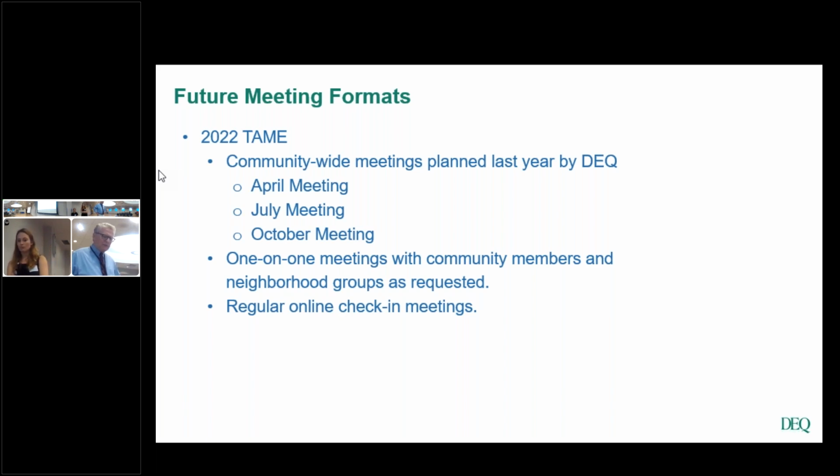Yeah, and just as a side note, I don't know how much you heard about these issues with supply chain. Well, they're real, and some of the hardware that we've been purchasing for this project has taken far longer than expected, at least based on historical averages. So that's another difficulty here. We just don't know what kind of impact that will have on anything we put into the procurement process. So we're a little bit hesitant to nail down a specific date. I will say this, as soon as we can possibly make it happen.